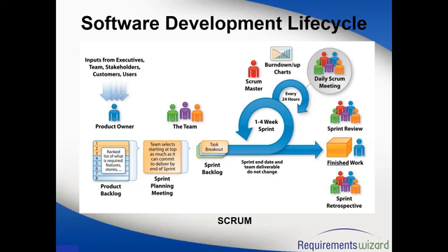One thing here is the sprint team cannot just pick the stories from the backlog. It has to be done based on the priorities set by the product owner. That's very important. My sprint team cannot say, okay, these are the easy ones, let me do 6, 7, 8. No, because the product owner puts the priorities this way: top 1, 2, 3 are most important, and as you go down the list, it becomes less important.